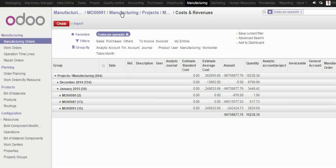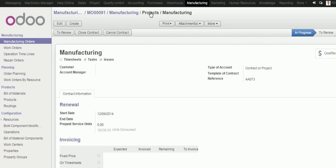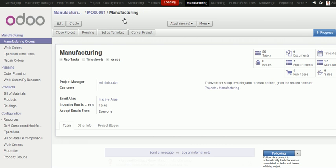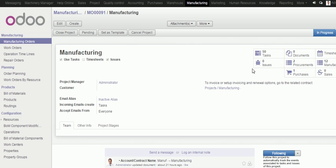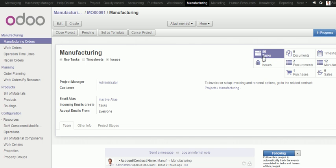If you see, if I go to my project, well, this is the analytic account, the one before. I can see that I will have all the tasks related to my manufacturing order. Each operator working in a manufacturing order will have his own task to put the real cost.